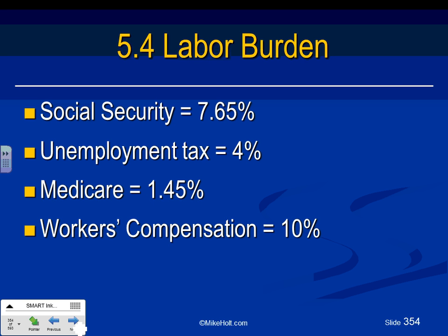This is when you work with your accountant, guys, and people who do all this stuff for you. So these are in addition, that's your burden. These are going to be your burden above and beyond your dollar value for your labor. Any comments, any questions? So Jeff, if your dollar is $18 an hour, your job average, you need to accommodate a burden for each one of these. So you keep upping your dollar value to pay for all this stuff. Any comments, guys? Any questions? Jamie, does it make sense?